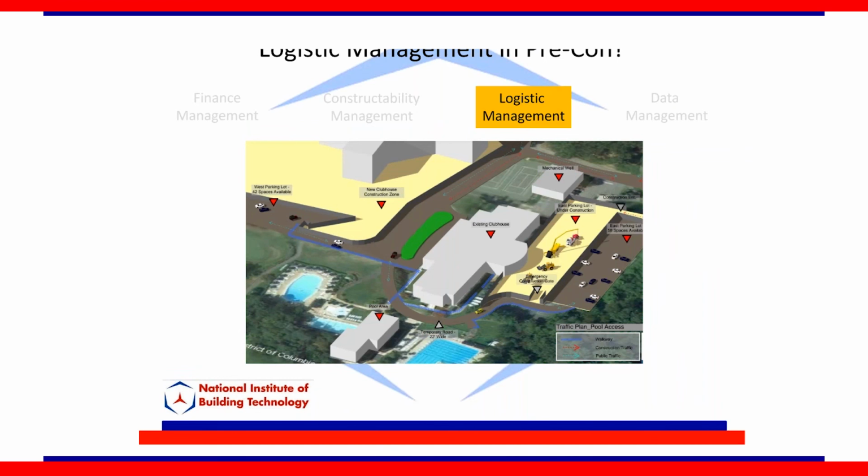Here's another tool. This is done in SketchUp. Simple tools like this help explain things to clients if they have a big facility. Sometimes they have an existing facility and they're building on top of it, adding a facility, which means they have to maintain their customer traffic while they build the new facility. It's very important for them to understand: show me how my clients are coming in. Where are you locating the cranes, how many parking spots are available for me, and what will the traffic flow be as my clients come in?